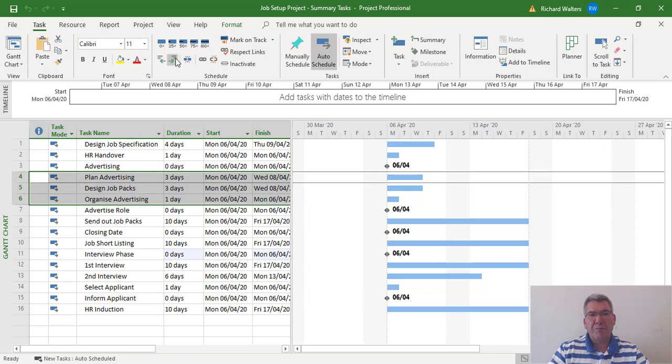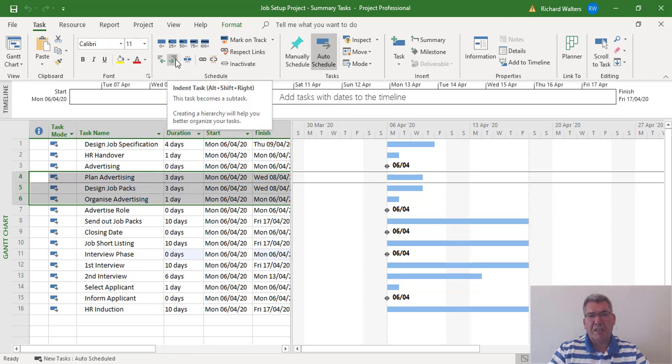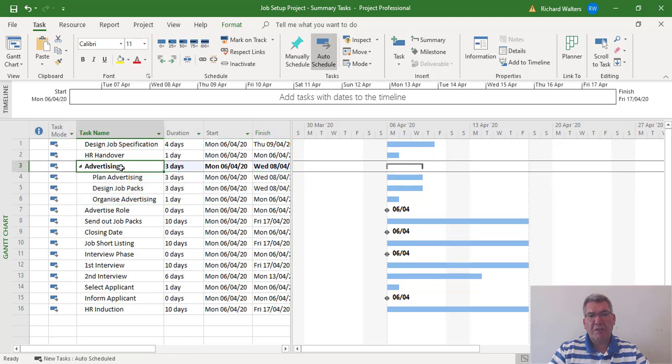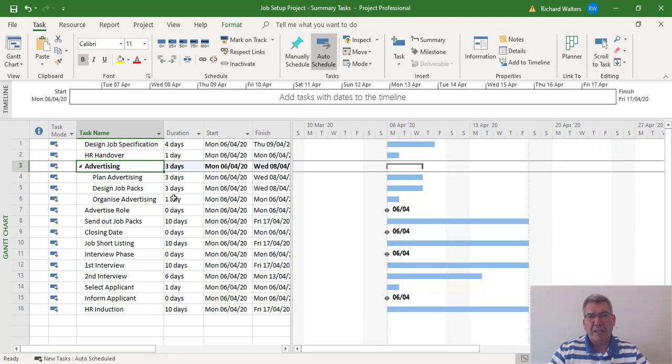you can then choose the option indent task. This will produce a summary task. The summary advertising produces a summary of three days because that's the longest duration. Right now they're not linked yet at this point in time.